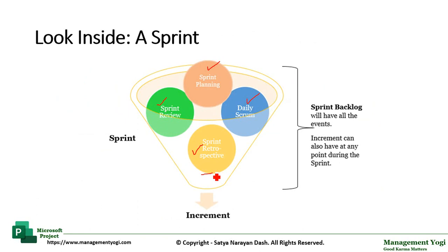Because the number of things or number of steps are performed for sprint retrospective. It is possible new action items or new improvement items or process improvement items may come up. And those improvement items have to be added to your product backlog, which is your overall plan. That is overall MS project plan. Your sprint backlog for the current sprint is getting completed. So if you are taking an action item, it has to be moved to one of the next sprint.